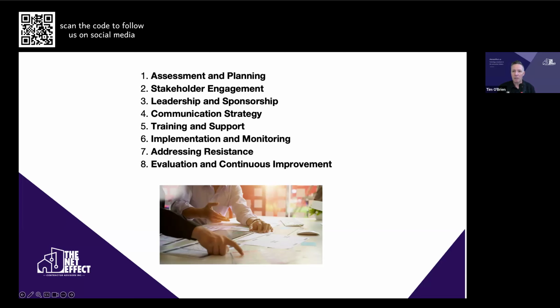Like I said, those weekly meetings, making sure that they're in place, and having communication. You don't want to inundate everybody with communication, ensuring that you're sending the right communication to the right places. We often will make a RACI matrix, seeing who's responsible in each different area, who we're going to send that communication to, who we need to talk to, whether it's the project management or the estimating within the organization.